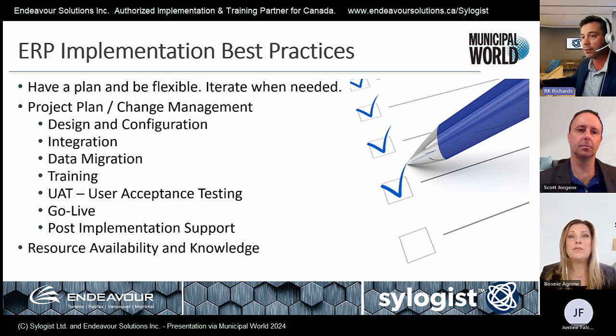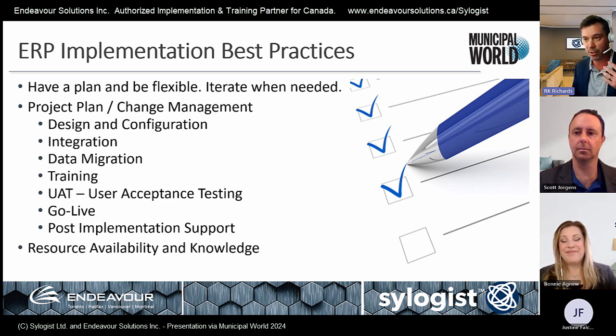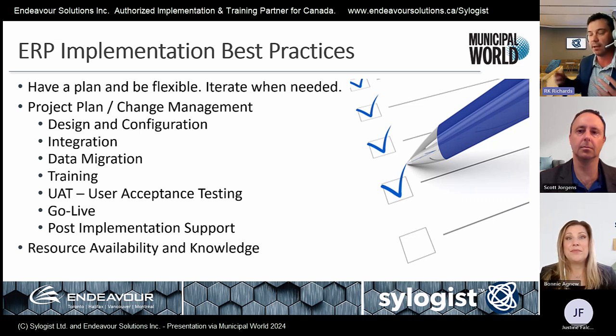The last thing I'm going to touch on here, Scott, is the go live and the post-implementation support. So go live, it's all hands on deck. Plan to dedicate 2 or 3 days where everybody's going to be in the software, everybody's going to be doing new stuff, and everybody's sort of available to help in whatever capacity is required.